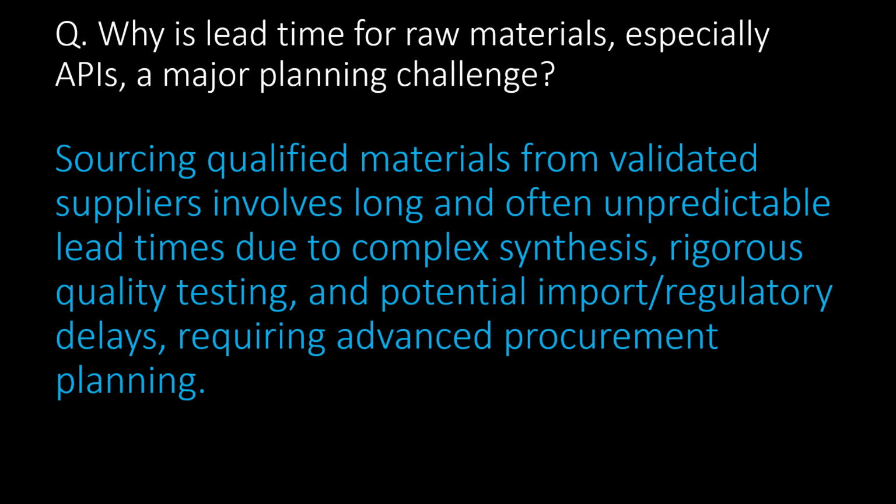Why is lead time for raw materials, especially APIs, a major planning challenge? Sourcing qualified materials from validated suppliers involves long and often unpredictable lead times due to complex synthesis, rigorous quality testing, and potential import or regulatory delays requiring advanced procurement planning.